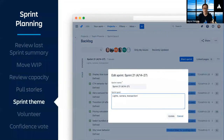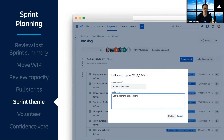Then we come up with a sprint theme together. Sometimes your product owner can start by reviewing their goal for the sprint first, and this can help everyone decide which stories to focus on with a collective theme. The theme helps us remember to keep the sprint focused and to avoid pulling different or competing priorities, which could create context switching and slow us down. Sometimes we like to have fun with it and see how creative we can get with our themes.